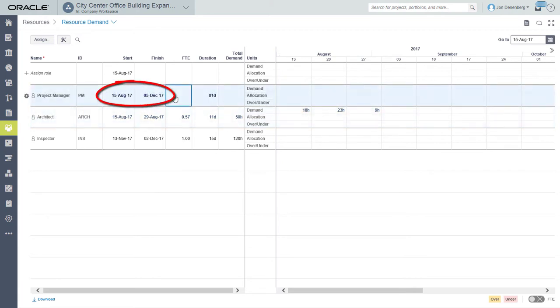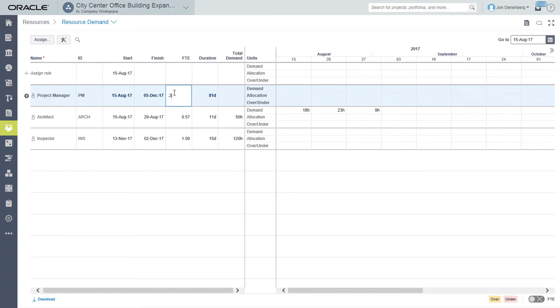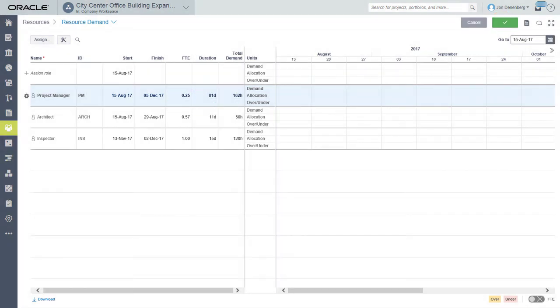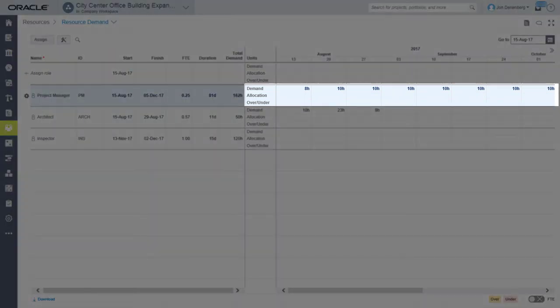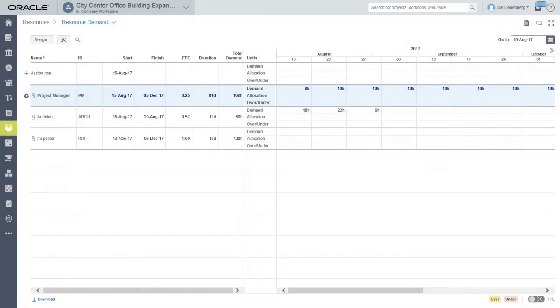Select start and finish dates. The project manager is expected to devote about one-quarter of his availability over the full duration of the project. Therefore we'll type .25 in the FTE column. Prime distributes 10 hours per week or two hours per day over the course of the project.